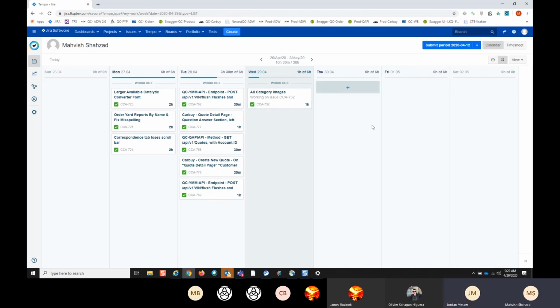Tempo replaces burning down hours in TFS. So we will no longer log hours on a story at the beginning and say it's going to take us 12 hours. We'll just log work directly to the JIRA ticket every day. So that's kind of how that replaces that on a one-on-one basis. Okay. Any questions you have to create test case? I can show you many times.